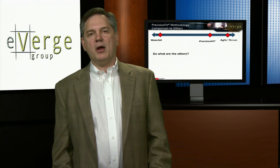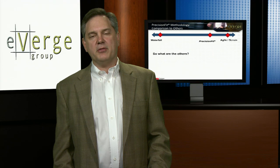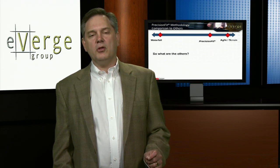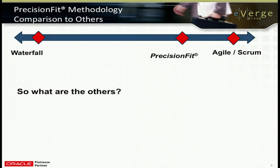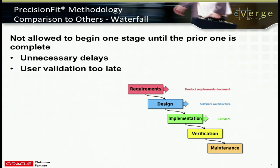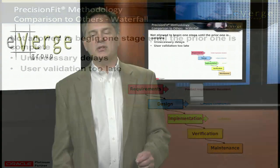As those practices get added, we continuously improve our methodology. This methodology is fully integrated in our SharePoint system, and we need your help in maintaining that system. Let's talk about what the methodology is not. The waterfall concept means you can't begin one stage unless you've completely finished the prior stage. With custom off-the-shelf software like Oracle, that's simply not acceptable and leads to unnecessary delays — users won't see the system until it's too late.